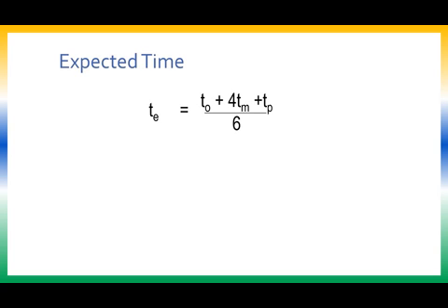So such time estimates average is taken. I am performing it 6 times, therefore once optimistic, once pessimistic, 4 times most likely. Add up all these time durations divided by 6, that I will consider as the expected time estimate.